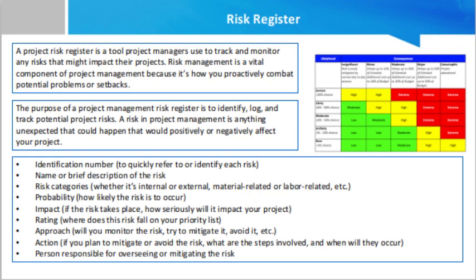Rating. If you are using the qualitative risk assessment method, your rating is typically probability multiplied by impact. If the probability is high and impact is medium, then your rating would be 12, that is 4 multiplied by 3. This method gives you a simple way to sort and prioritize risk quickly. Quantitative risk analysis is not quite as simple.